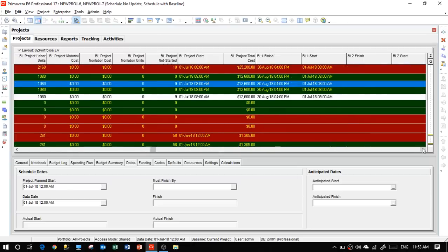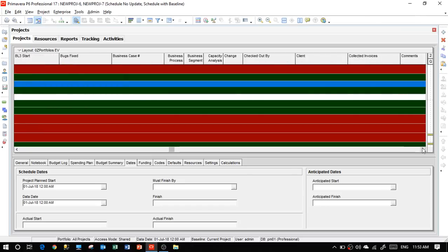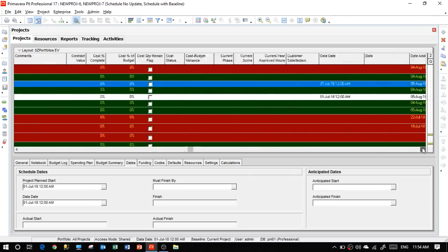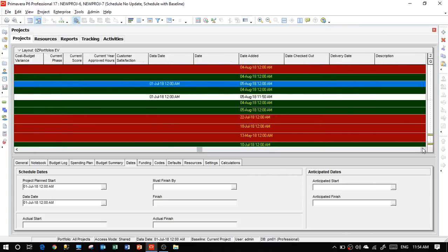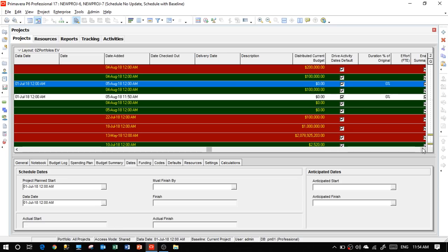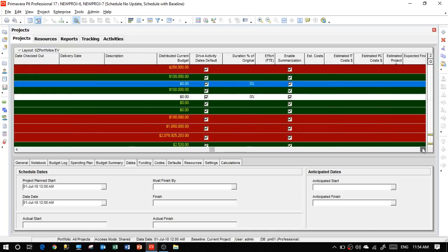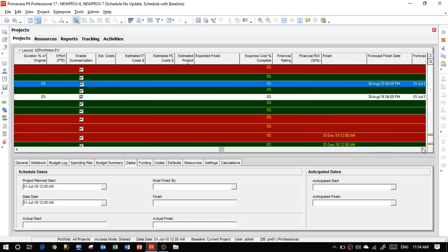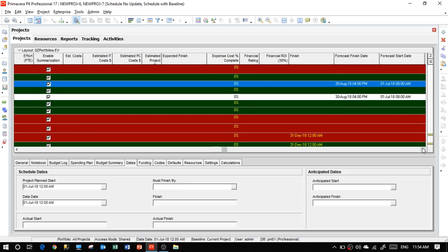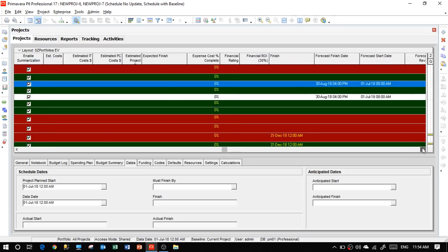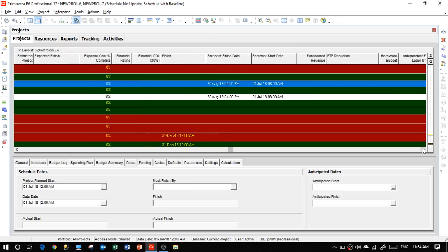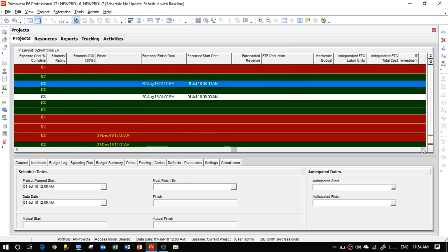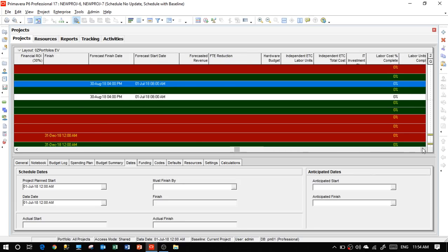So automatically Primavera, when adding a baseline, is comparing the project with itself for any change you make. Now, putting and maintaining a baseline as an option there is only, and I say only, for if there is any change in the project afterwards, it will compare it to the assigned baseline. So what I say is, the first project, if you change it now for duration or anything, it will consider it as still correct as a baseline with the same data you are comparing with, because it's comparing with itself. However, the second one is comparing with the fixed baseline schedule.